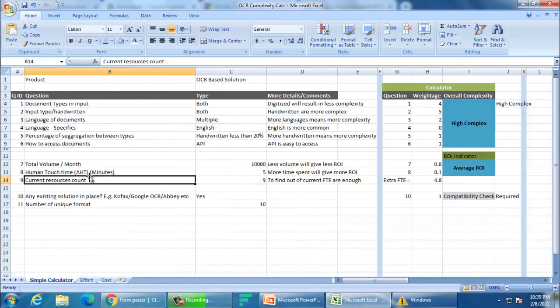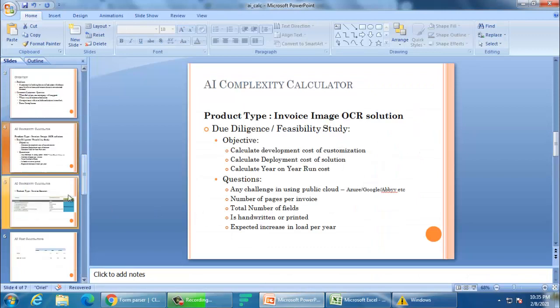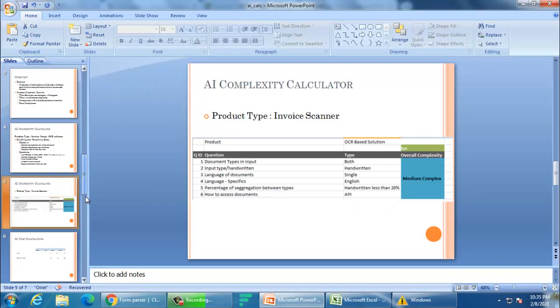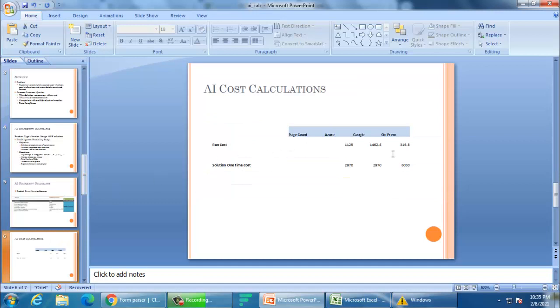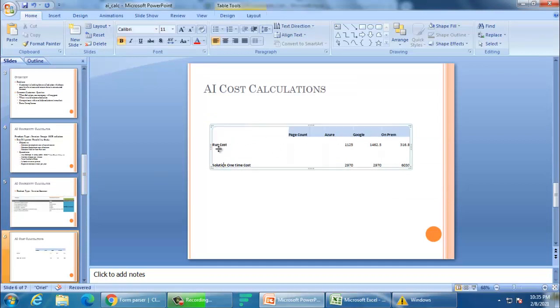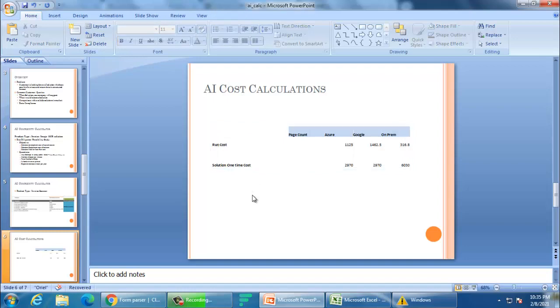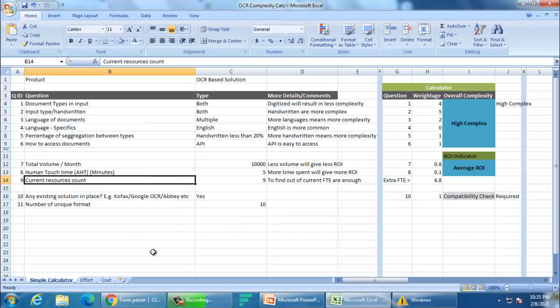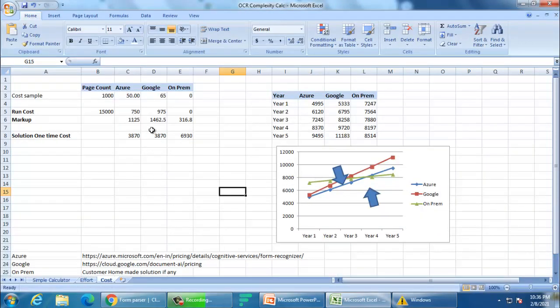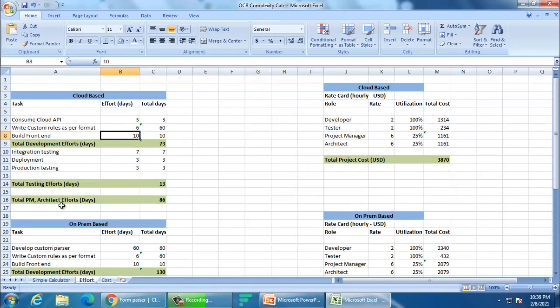That is part one of this tool — whether you should pick this project and whether it will give good benefit to the customer. The second thing, if you remember from the presentation, after displaying this complexity we moved to: what is the one-time cost and what is the run cost — the year-on-year cost. To calculate this, let's go to the costing part. Cost cannot come easily — you cannot simply say 'I need $10,000 for this.' You need a base, and to arrive at that you first need to calculate the effort — how many hours you will spend to build the solution.